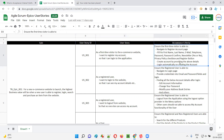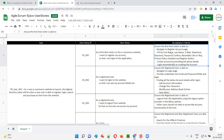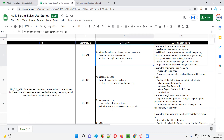The product owner is mentioning these conditions so that when the time comes where the development team and testing team has completed the work of this user story and demoed it to the product owner, the product owner will check all these conditions mentioned in the acceptance criteria. Only if all these conditions are satisfied will the product owner accept the work done by the development team and testing team as part of this requirement.